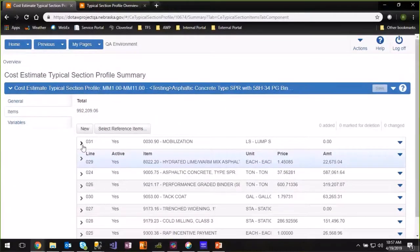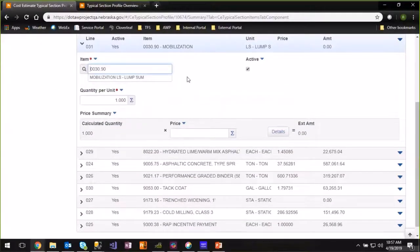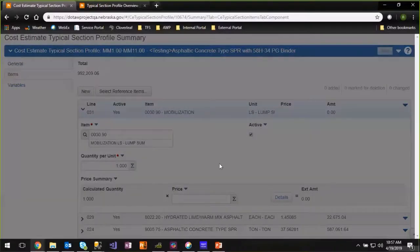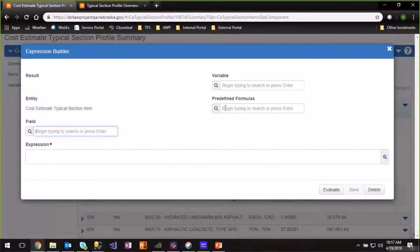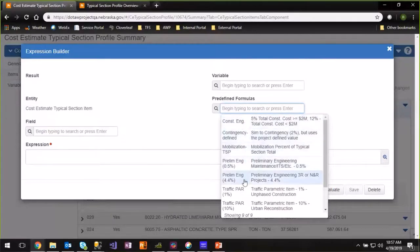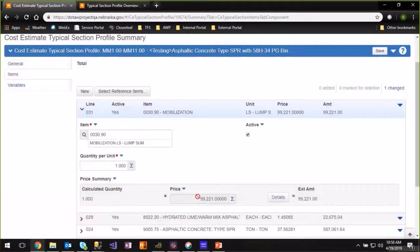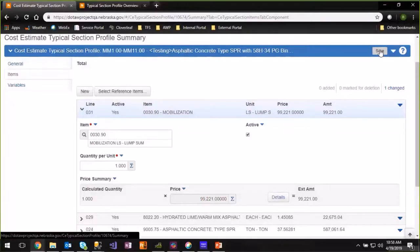The mobilization item is a little unique in how we generate the price. Our variable was left at 10% of the total cost. To calculate it, click the Sigma button on the right, then under predefined formulas put your cursor in there and hit Enter. There's a list of predefined formulas that help calculate specific prices or quantities. Choose the mobilization typical section formula — it adds a formula in there. Hit Save, and as you can see it generated our price. We'll go ahead and hit Save again so we have our 10% mobilization in there.